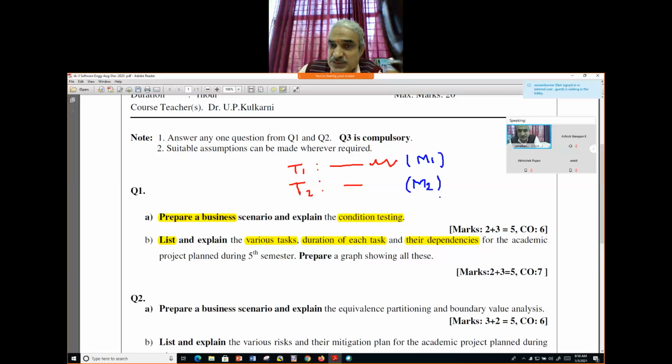Milestones produce certain outcomes in project progress. Certain project progress is seen at every milestone. What are the different milestones? One of the milestones may be generating the software requirement specification (SRS). Another milestone may be procuring particular software and completing the training program. Are you getting it? Yes, sir. Now, this is specific to the project you are doing.